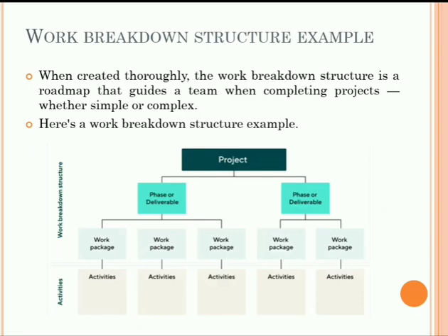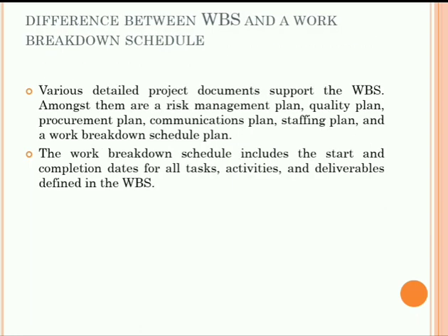Now let's move to the next point, that is the difference between a work breakdown structure and a work breakdown schedule. It is a structure and this is a schedule. Get the difference between these two. Various detailed project documents support the work breakdown structure. Amongst them are a risk management plan, quality plan, procurement plan, communication plan, staffing plan, and work breakdown schedule plan. The work breakdown schedule includes the start and completion dates for all the tasks, activities, and deliverables that are defined in the work breakdown structure.